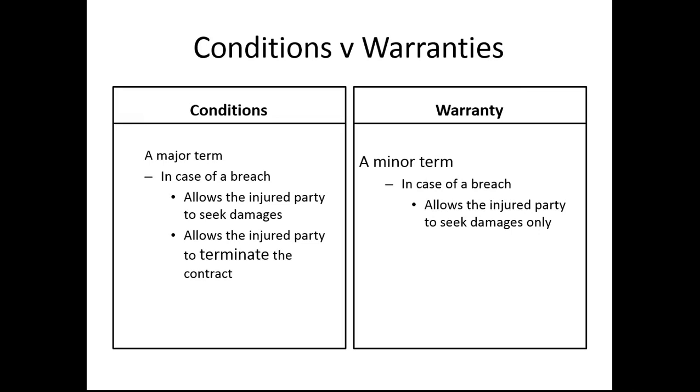It's not so easy with express terms on which are conditions and which are warranties. However, I would say that normally, and normally is a word I have to use when we use legal because I have no idea what a court would say, but normally time is not considered a condition, it's considered a warranty.